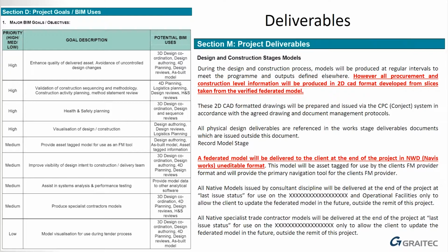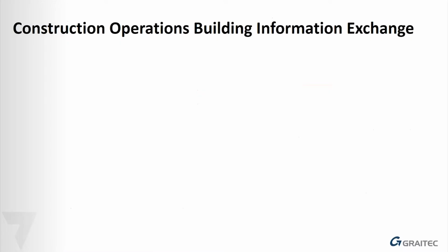So manufacturer, we'll refer to something called COBE, and I'll talk to you about that in a second. But the other level of information that we want in there: does this product come with a warranty? If so, how long is the warranty available? Can you get spare parts for that component? And if so, where and for how long are the spare parts supplied, etc.